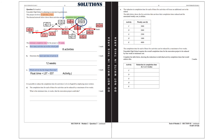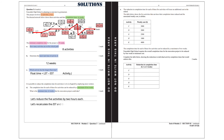Part D. It is possible to reduce the completion time for activities C, D, G, H, and K by employing more workers. The completion time for each of these 5 activities can be reduced by a maximum of 2 weeks. What is the minimum time in weeks that the renovation project could take? We are going to reduce the 5 activities by 2 weeks: so 3 weeks for activity C, 7 for activity D, 2 for activity G, 3 for activity H, and 5 for activity K. We recalculate the early and latest starting times, and that gives us the minimum time of 29 weeks.